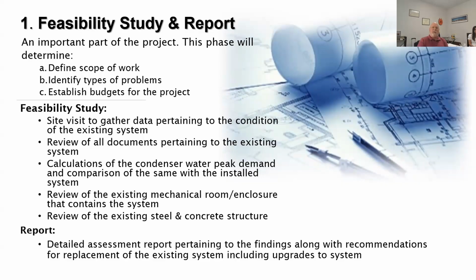Versus if you were to go, because one of the things I hear is, well, why don't I just hire a contractor? And the contractor can just come in and replace what's there. Yes, you can, but most contractors, especially the good ones, are going to recommend you engage an engineer to be able to do the design, because of exact things like this, that there's things that they don't have the staff to be able to evaluate and determine, hey, does the steel need to be upgraded? What needs to be done to upgrade the steel? That's not their position. Their position is to take it off and put back on what has been selected.